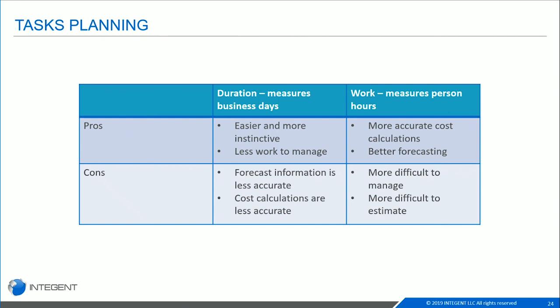So duration-based planning is a scheduling method that is a little bit easier to manage and estimate and track because your estimates are provided as days, 1 day, 4 days. And the work is calculated whenever you put resources to that. It's automatically calculated there, as long as you have automatically scheduled. You would use the percent complete versus percent work complete to track the progress. You'll enter in duration values. You'll focus simply on any of the duration columns available there. Your task duration can range from minutes to months. You can do any scale that you'd like.